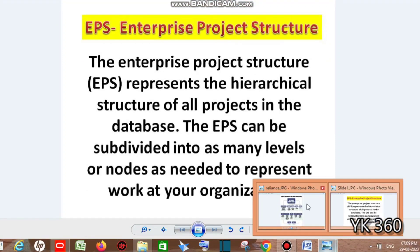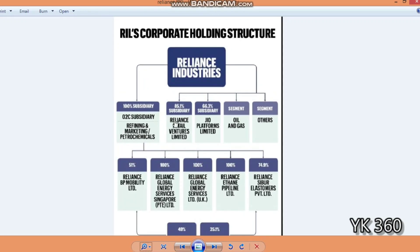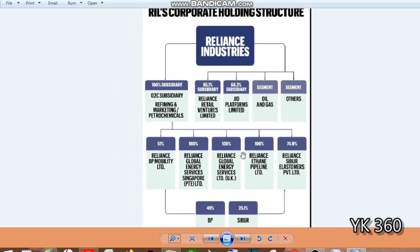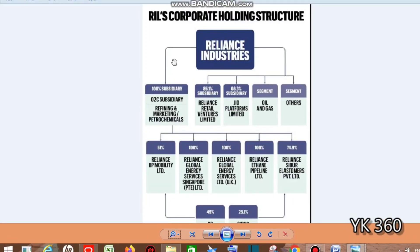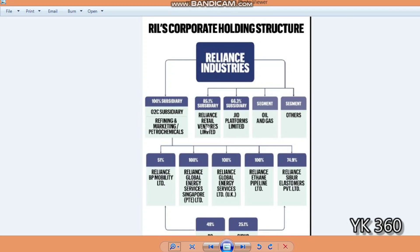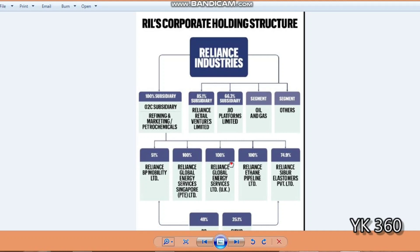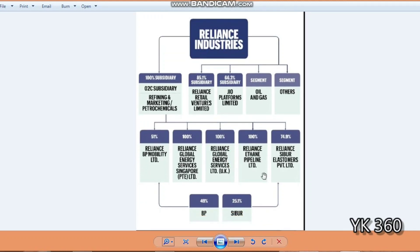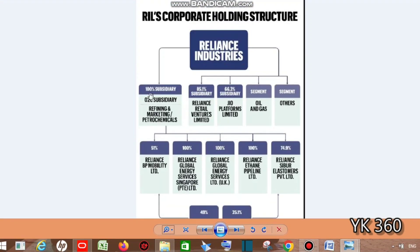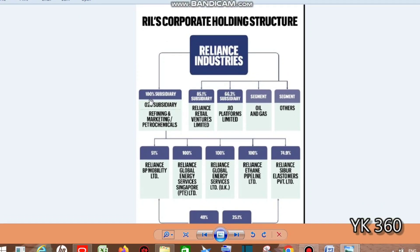Let's look at an example using a Reliance Corporation holding structure. Everything in this chart is an EPS. The major EPS is Reliance Industries, and under this EPS there are minor EPS nodes. Under each minor EPS, it is further divided into smaller categories. If you need more, you can create additional EPS under these categories.